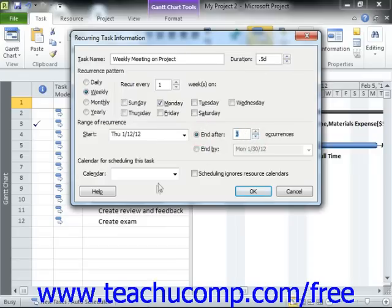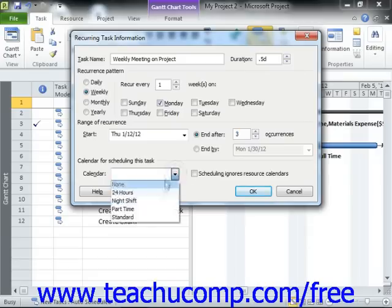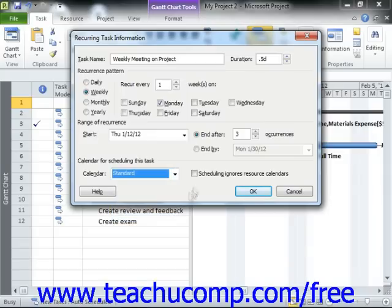In the Calendar for Scheduling this task area, use the Calendar drop-down to select the desired working schedule calendar. Once you've finished, click the OK button to save the recurring task.